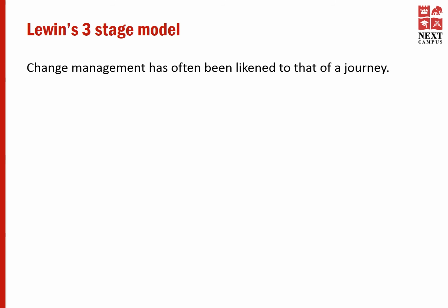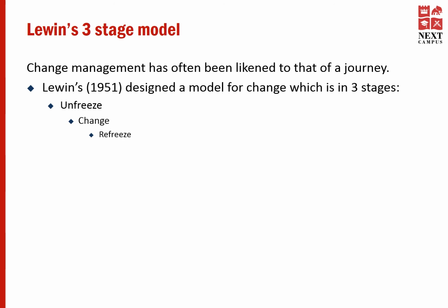Let's study one of the famous models widely used by the project management teams and organizations, Lewin's three-stage model. Change management has often been likened to that of a journey. Lewin designed a model for change which is in three stages, namely unfreeze, change, refreeze.